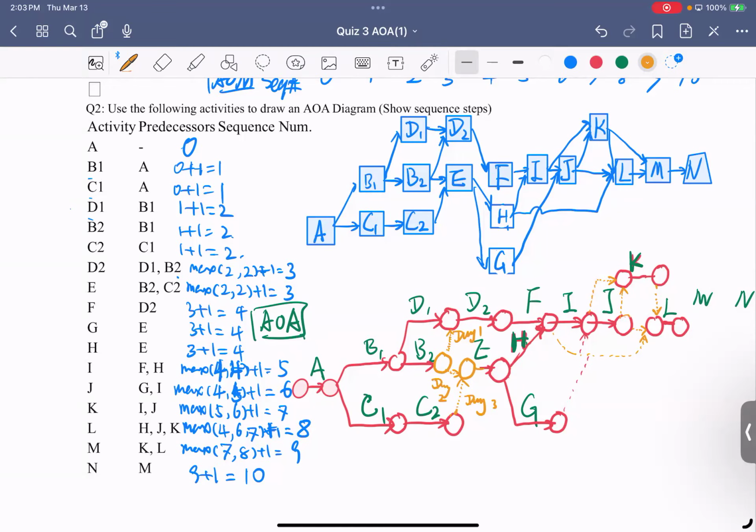We're using this node here without creating any relation because this cannot go reverse, right? So in this case, we can move this one to represent the L, K to L directly, right? So we can remove this one and directly link it here.